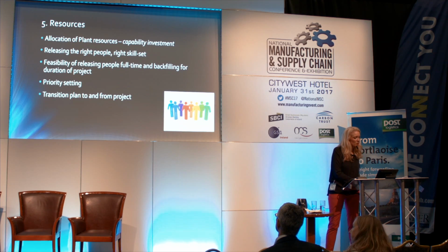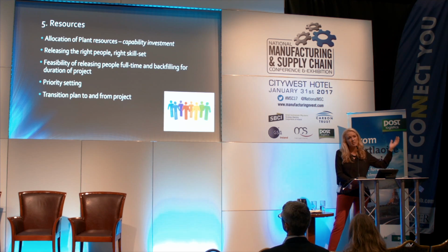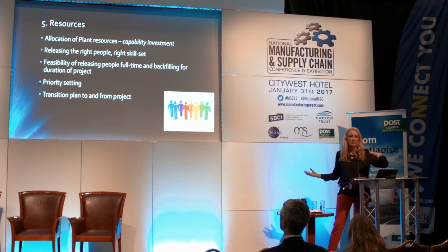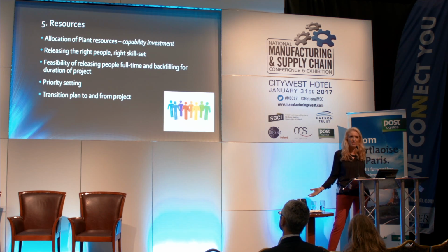So resources we talked about, and that is a capability investment. And then also think as well, if you can, and if there's any budget, at least fight for it. See who you can put onto the team full time. And then look at some backfills that you could bring into their current day-to-day roles. Again, a great opportunity to bring some capability into the organisation.